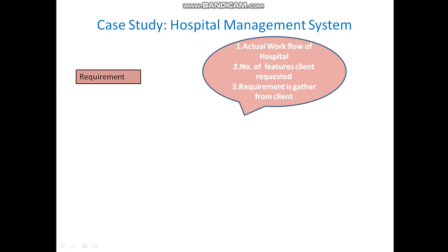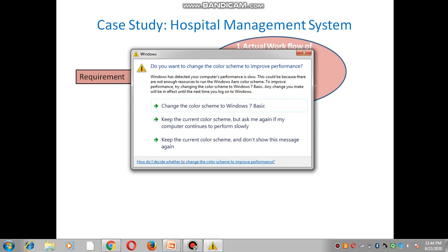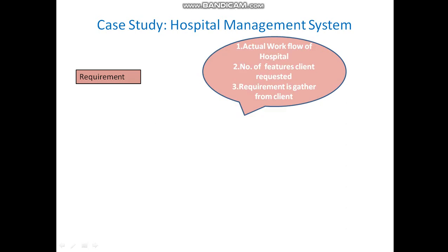This is the automation the hospital wants — only for this process involving these two persons. It is a small system, and there is no requirement to add more users, register doctors through the app, or check availability. The doctor has not demanded those options — only this specific automation. That is why, in this situation, the waterfall model is appropriate. In this way, the complete requirements of the hospital are gathered.